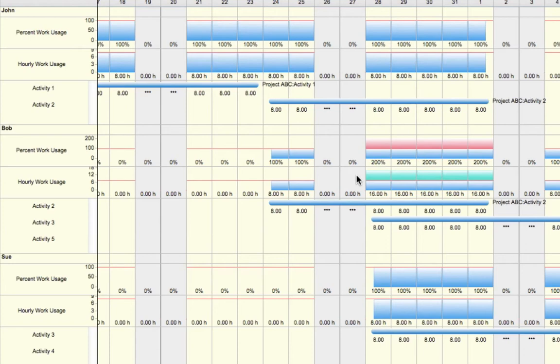We'll notice that within the activities, this is because Activity 2 and Activity 3 currently occur within the same dates. One way we can account for this is by using Spot Allocation to reassign the number of hours that Bob will be working on either activity.